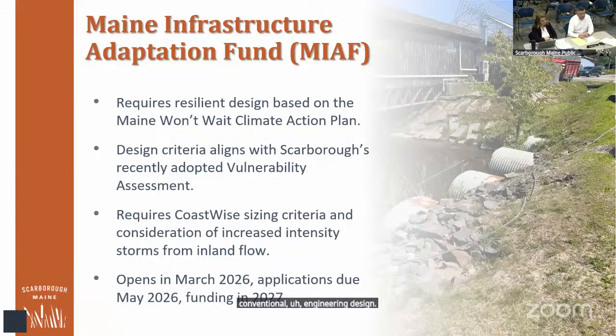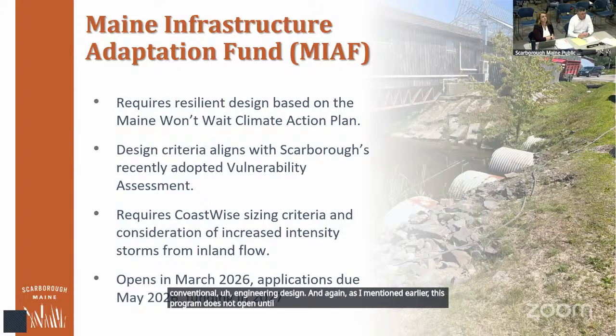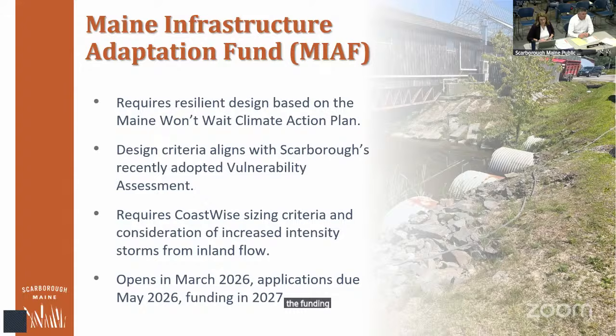And again, as I mentioned earlier, this program does not open until March with applications due in May. The funding is also not available until 2027, which is a major consideration. So a pretty important theme you're going to hear here is what is the funding available to us, and what does the timeline look like? Because those are 2 critical factors.